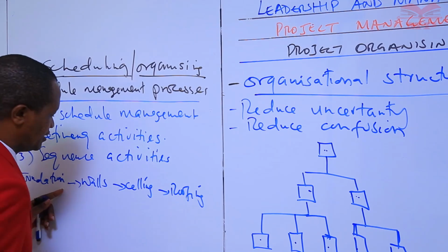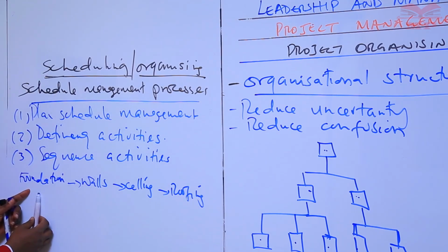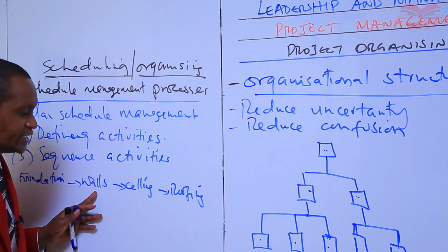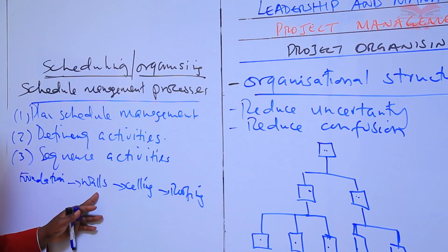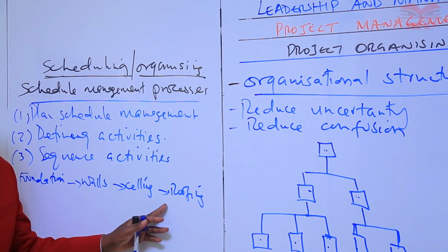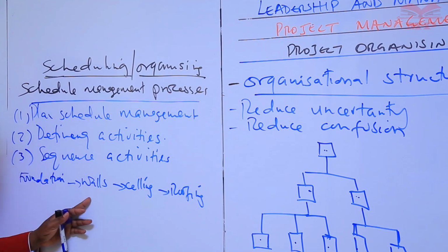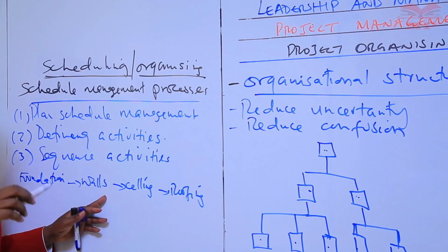If roofing is the end and foundation is the beginning, then we're saying that the rest of the activities must have a successor and a predecessor. Every activity except the first and the last should be connected to at least one predecessor and at least one successor activity.